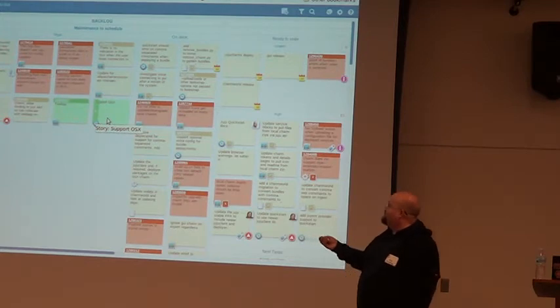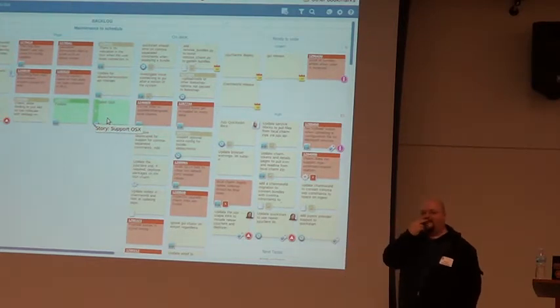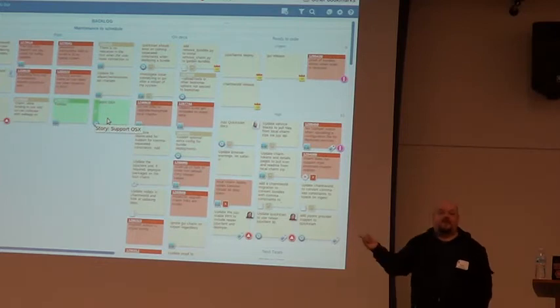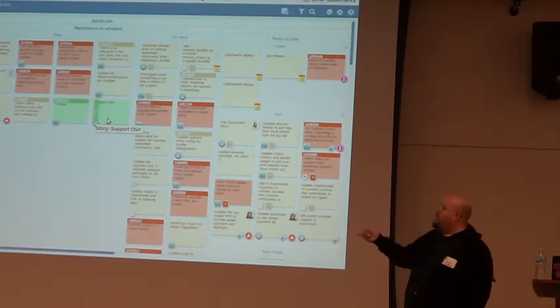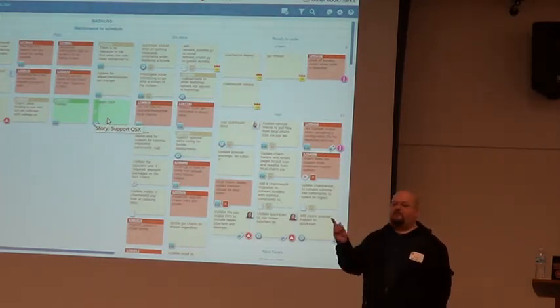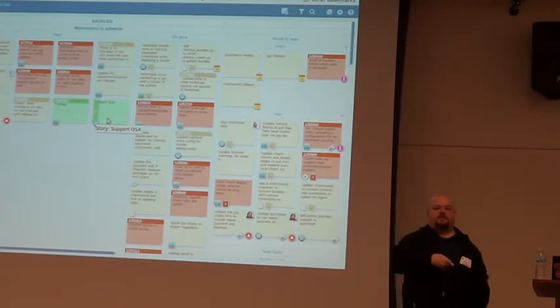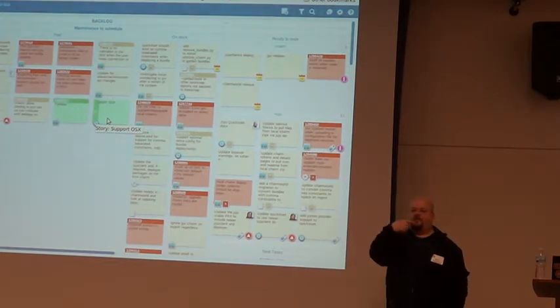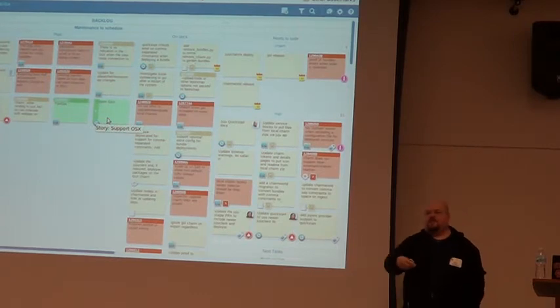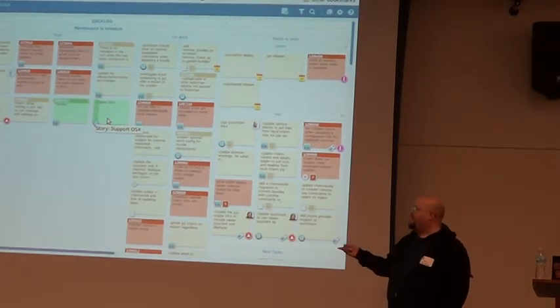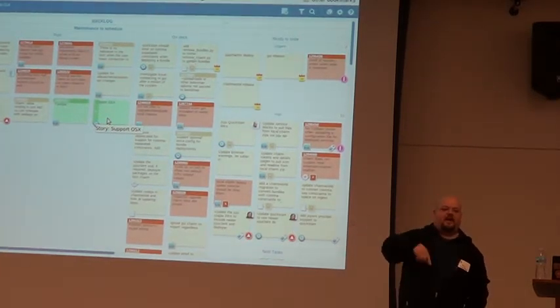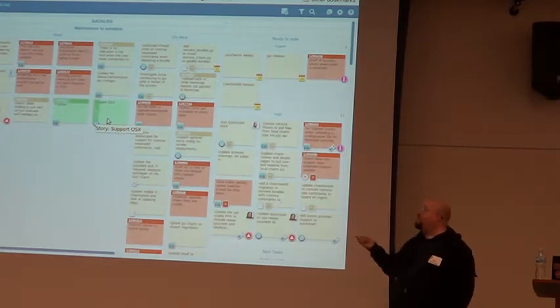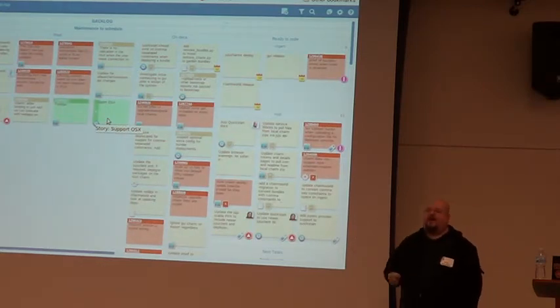We have to make sure that A, all our dependencies will build in OS X. We have to make sure that we update the set of code that installs Juju. Because right now it does apt-get install, which apt isn't on OS X. And so, this OS X card will be a feature card to represent this task is in progress or whatnot. But we'll have individual cards for each chunk of work that will be done one at a time. The other one, tooltips. So, we've got to add tooltip support. Tooltips need to belong in about a half dozen different places in the UI. So, we'll break that down. We'll create a base tooltip like JavaScript class. We'll apply it to one location, get it reviewed, make sure that the theory and the widget design and all that stuff is good.